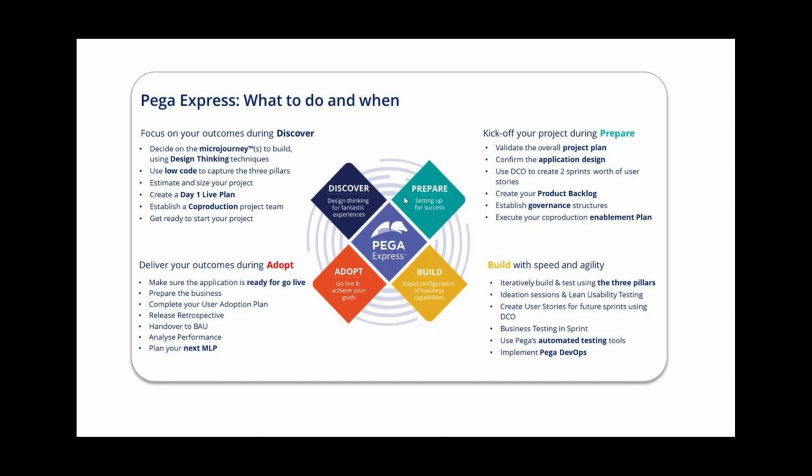At the beginning of the prepare phase, in the transitioning phase, the sales team will give a handoff, will give KT, to the dev team. The dev team includes the LSA, system architects, testers, scrum master, and project delivery lead. So basically they will tell what is agreed with the client and what is in the scope of the first MLP.